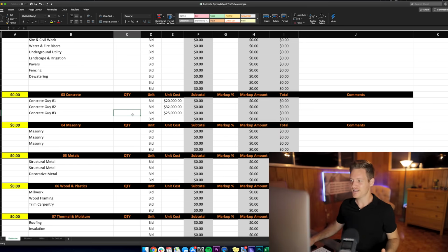But let's say he's this $25,000 guy. Well, maybe you can negotiate with the $25,000 guy because he saved your butt and you like him. But this $20,000 guy really didn't get it all. And the $32,000 guy is just high. Not on drugs, but just with his money number. Okay, so you want to go with the $25,000 guy, and you might be able to buy him out a little bit lower. Maybe you get it for $23,500 or $23,750 because after you get the job, you negotiate.